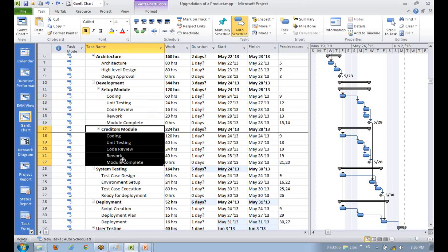The target date of this sprint has to be met. As we were looking at the very first, the triangular constraint. So in a sprint, if the date is fixed, maybe fewer components will go or functionality will reduce, but the date is more important there. So when there is a challenge on time, you reduce the scope. Correct. Agree. What you were explaining at the beginning. Reduce the scope. Okay. Some defects go, next time we will fix them. That always happens actually. That is the most common scenario.